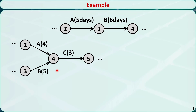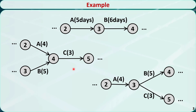This is the second example. Both activities A and B must be completed before activity C can begin. They are predecessors of activity C, and activity C is the successor of A and B. In the third example, activity A must be completed before activities B and C can begin. A is the predecessor of B and C, and B and C are successors of A.